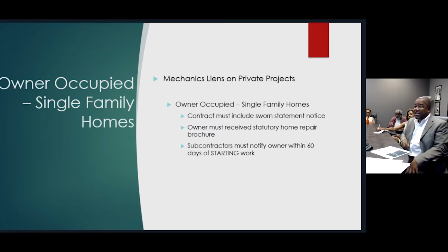Yes. Now, subcontractors working under that small GC doing this home work have a responsibility, within 60 days before they perform the work, of notifying the owner that they are a subcontractor on this job and are about to perform their work. That's for the protection of the owner of the property. You don't want the owner having to face a number of subcontractors who come up later and say, wait a minute, I was on that project too, when the owner had no idea. He's under the impression he's paying this contractor to provide these services, and all of a sudden somebody comes out of the blue. So again, failing to fulfill these compliance-related issues in the statute could void the entire contract.